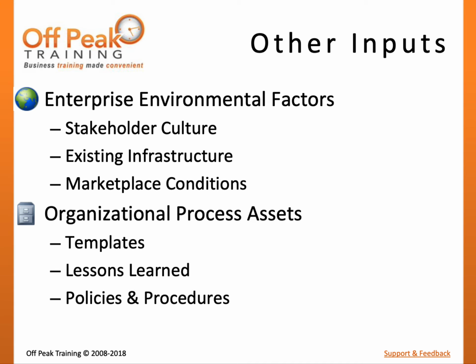Two additional inputs include enterprise environmental factors and organizational process assets. Enterprise environmental factors can be a major input to defining the management approach, particularly government standards, stakeholder culture, and the organization's existing infrastructure and tools. Organizational process assets may contribute a communications management plan template and lessons learned.